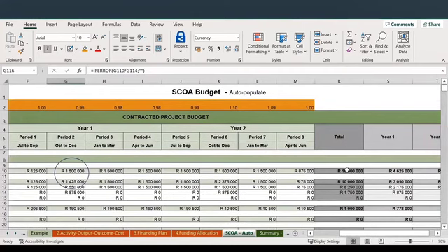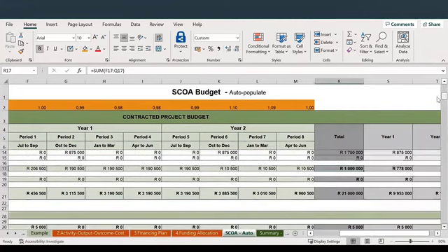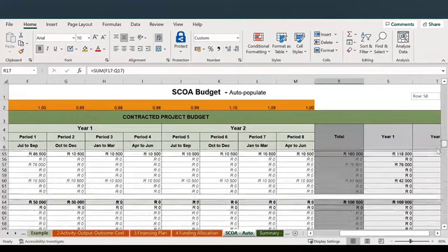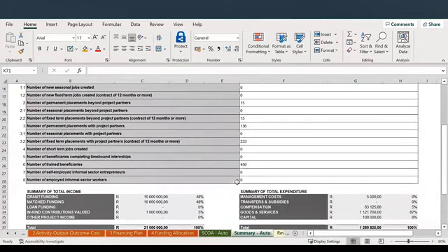Of course, everything must balance. Here's our grant, our 10 million grant. Here's our 10 million cash match funding, 8.25 from OWN, 1.75 from the Vista Foundation. Here's our 1 million in kind, and then the expenditure will follow as you map it out. Then we have a few other tabs that are notable, just some summary. This is just for our internal use, but again, it's for you to check. It's another way to check if this is what you intended.